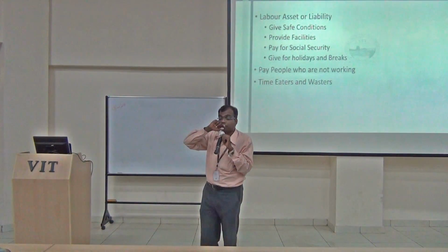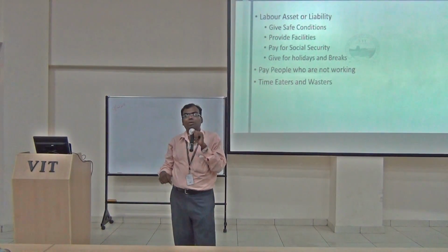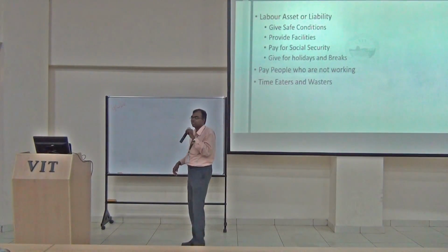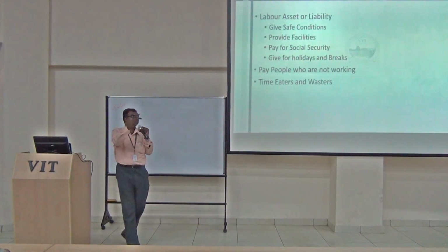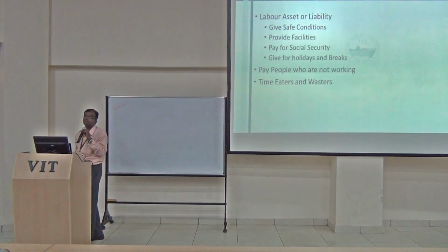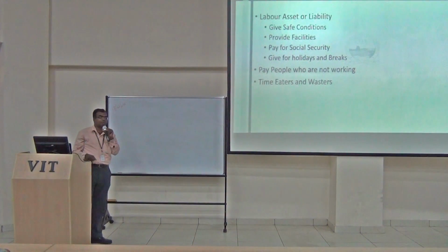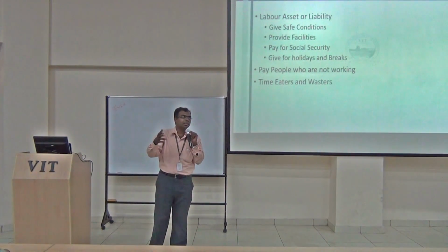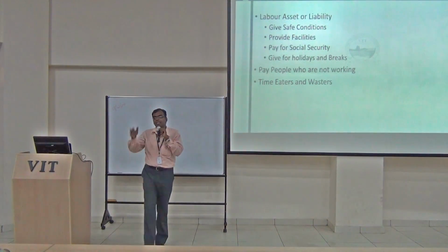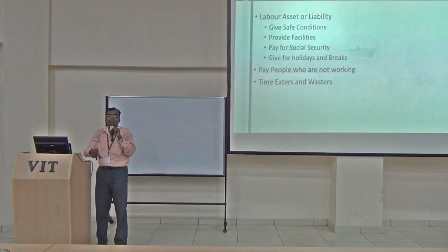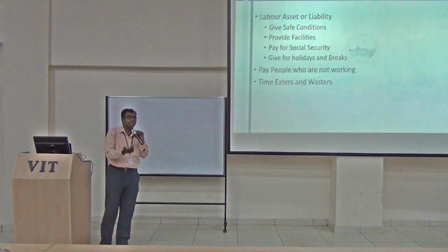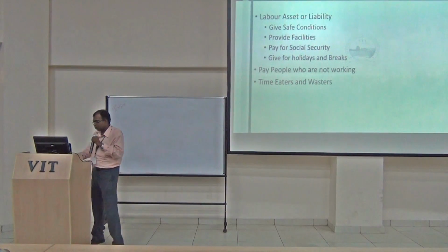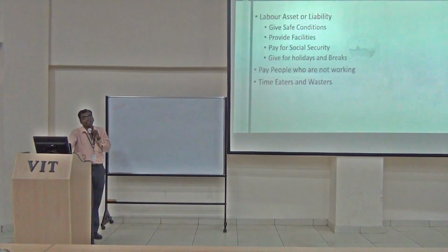Per tea break, 15 minutes tea break. This going up and coming down was 1 hour per time. So 2 times if you give tea, 2 hours almost you could say. Even if you say 45 minutes was saved, 45 plus 45, 1.5 hours people can save. So as a construction manager, you will also be faced with such challenges. You will find that there are places where you can actually avoid wastage of time. Your 15-minute tea break is still 15 minutes. Now that going and coming, people feeling tired, getting back into that mood to work, all that is getting cut down. So how we are going to go about that is a challenge.